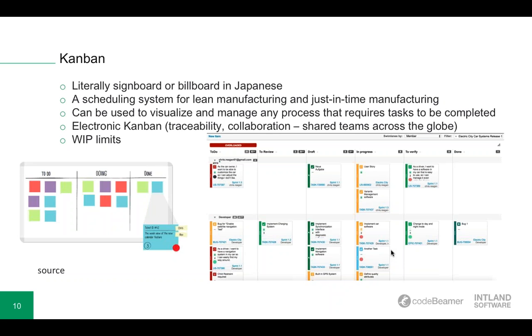Some teams still choose to carry out the estimation in order to have more predictability, of course. Or another approach is just to have items that are similar in size or in difficulty, and therefore they can be completed in the same amount of time. So that's one way to leave out estimations. Kanban allows the adding of new items whenever there is enough capacity in the queue, and therefore Kanban is very useful for functions with continuous flow of new items. If a column is overloaded, however, it is obvious what needs to be worked on and helps remove bottlenecks from your development process, as long as your developers swarm on that column and they're working on the right things at the right time.